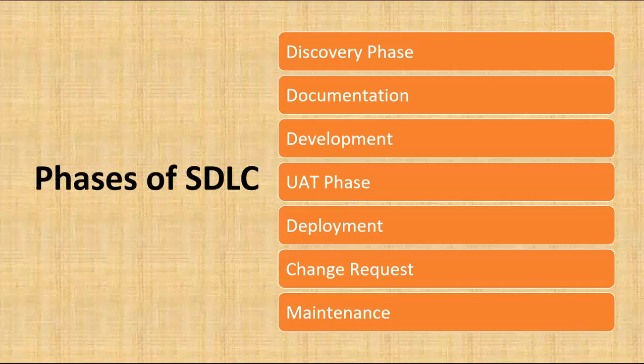As per the standard, you give the estimations, and you take the technical architect's help and prepare the estimations, take the sign off from your COE heads, and deliver to your customer and set the expectations and set the estimations in the initial stage only. This is something which BA do also.